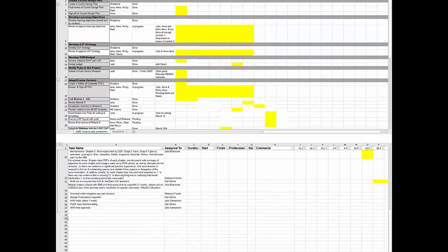On the screen are a few sample project plan formats. Now that we know your deadlines and have planned who will do what, GLO will help you prepare a project plan. The project plan breaks down what needs to happen by when in an activity matrix, Gantt chart, or work breakdown structure, with assigned persons and target dates.